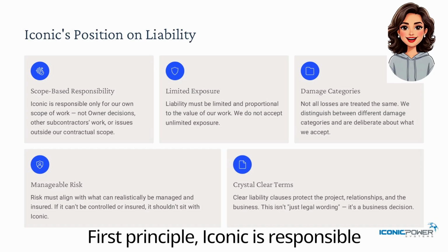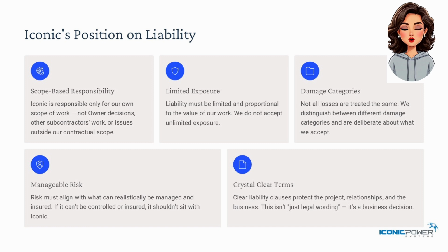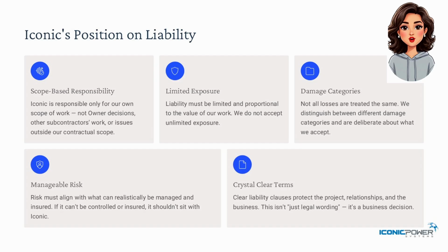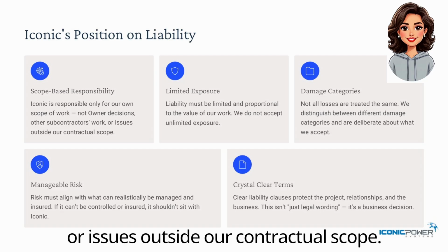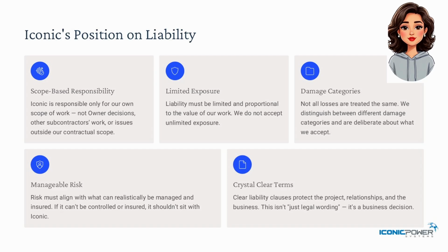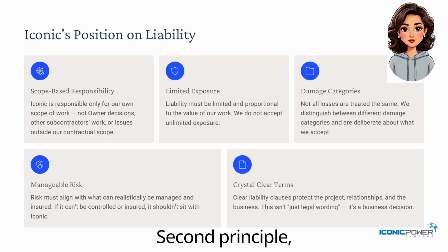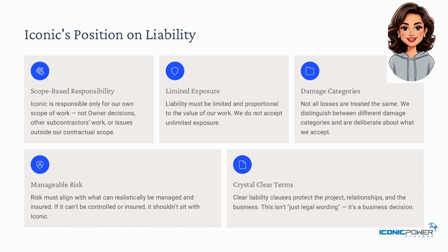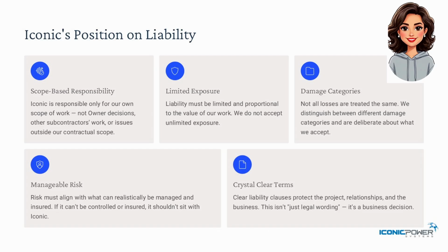First principle: Iconic is responsible only for its own scope of work. We do not accept responsibility for decisions made by the owner, work performed by other subcontractors, or issues outside our contractual scope. Responsibility is tied to fault, not proximity. Second principle: liability must be limited. Iconic does not accept unlimited exposure. Our responsibility should always be proportional to the value of our work.